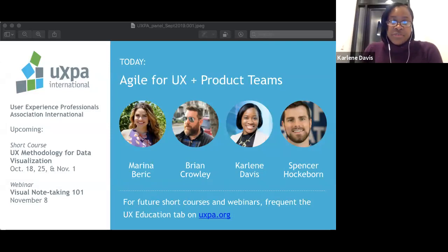I will say, as a delivery lead, what we do is work in a runway model where we have the runway team who's focused on doing the research, the discovery design, getting sign-off, approvals, and good understanding from the product owner, and ultimately working closely with the team, more or less in a program fashion. Another team member takes that work and breaks it down into user stories, and we have the refinement and also a design review so that the developers and the other team members are fully versed in what's being developed, the intent of that feature, and so that the intent is carried over to what is executed. In my opinion, that is a really good way of doing it.